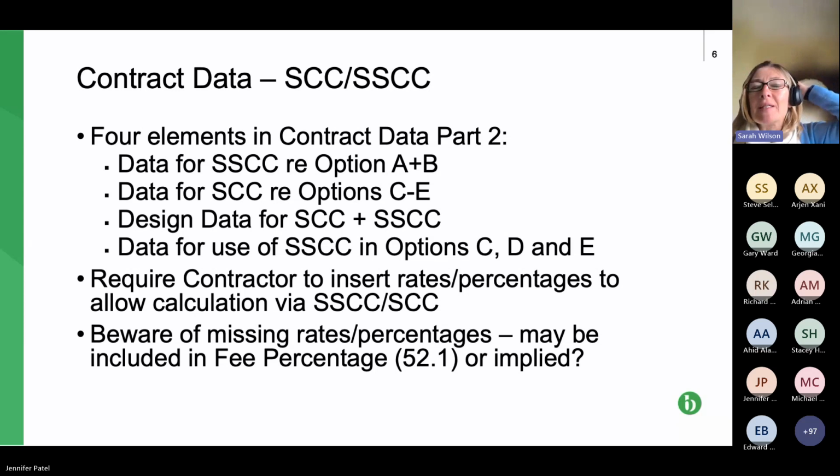A lot of this information that's been inserted is either for rates, so typically hourly rates for specific disciplines of people, so labourer, an hourly rate or a daily rate, for example, or percentages to be applied. So percentages, in my view, are always good because it suggests an easy, albeit rough and ready, way of calculating things.